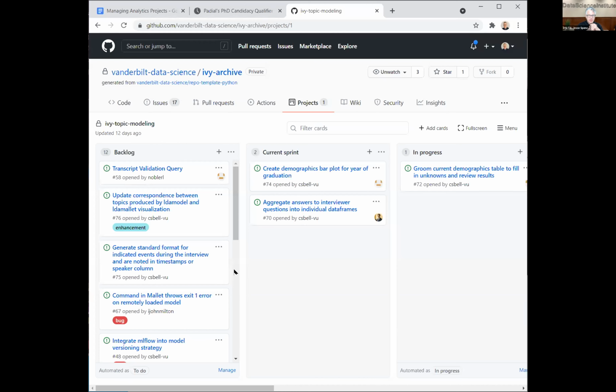And it's okay, just take a guess. What do you think is the most important thing over here? Andrew, what do you think? What would be your best guess about what would be the most important thing to do in the backlog? Would whatever's on top be most important? Yes, exactly. So let's double check this, because this is no longer numerical order. Yes, we can sort this. That actually turns out to be a really critical piece. You can sort this together, and this is actually some of what you do during sprint planning, and also what's called backlog grooming. Are all the things that are most important to do next here in the right order?